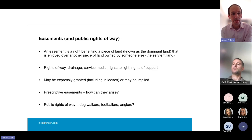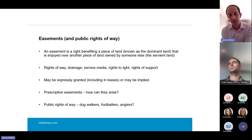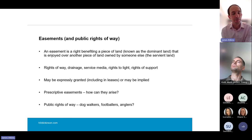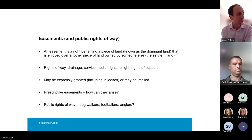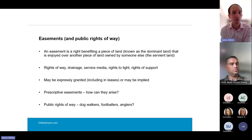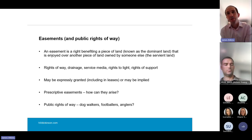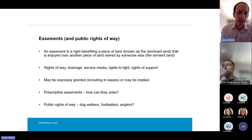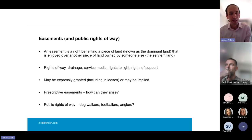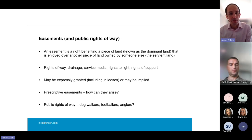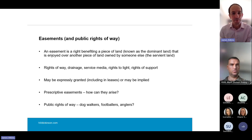Public rights of way are about the public at large. Do you have parts of your estate being used by dog walkers, footballers, anglers? If those people are doing it for 20 years, there may be a presumption that the land has become a highway, or they may even be able to apply for the land to be treated as a town or village green. An analysis of who's using the site and the implication of that can be helpful before you commence the design phase.